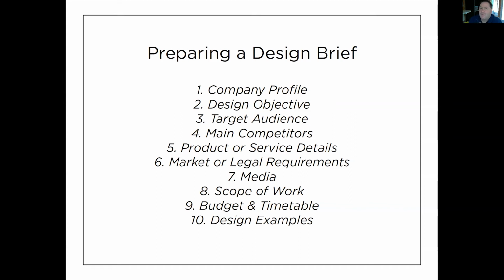And so on and so forth. It's like it keeps building upon itself. So that 2-hour project may end up taking you 6-7 hours to do in all entirety. Okay, so it may take you 2 hours to design it, but when you factor in all the changes, all the corrections, the presenting, the getting it ready for the printer, all that stuff does creep up.